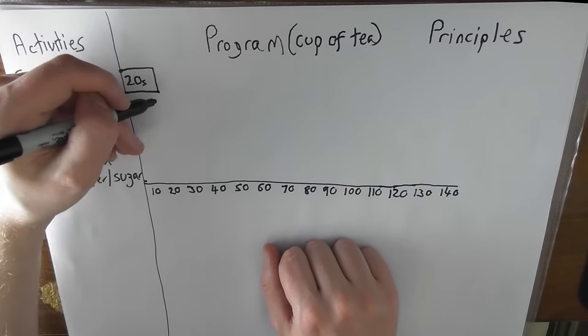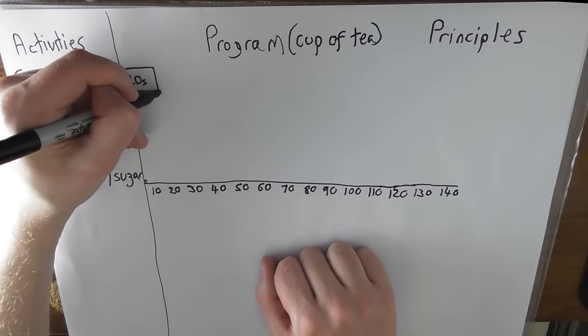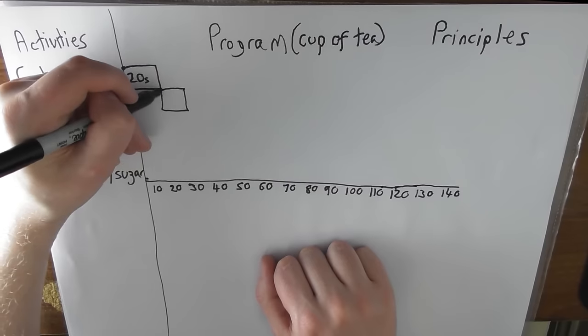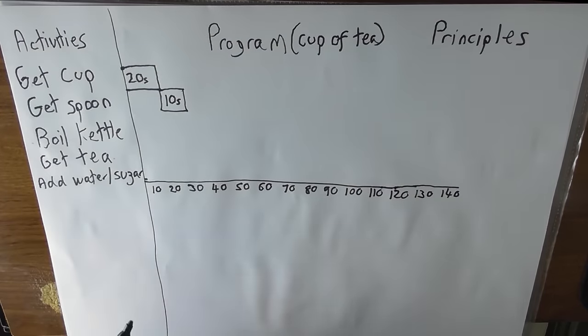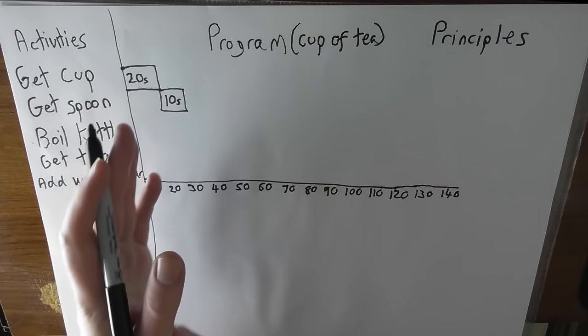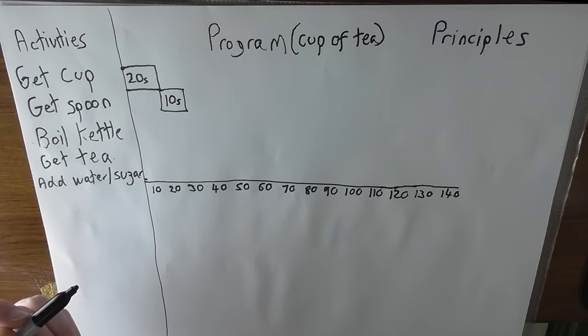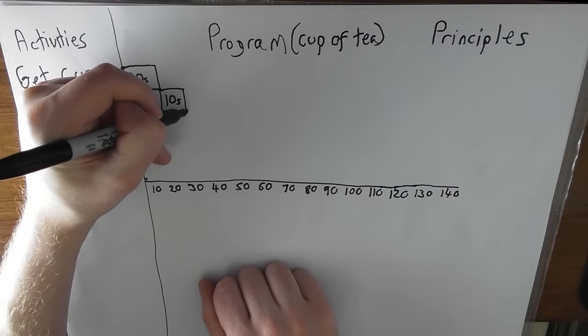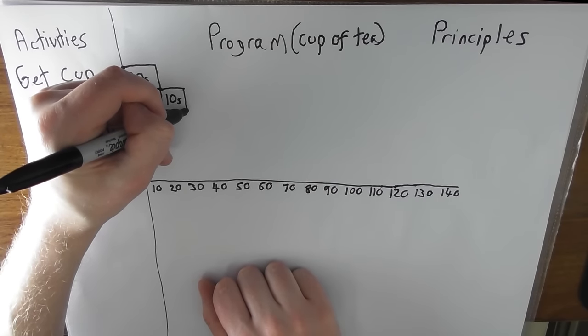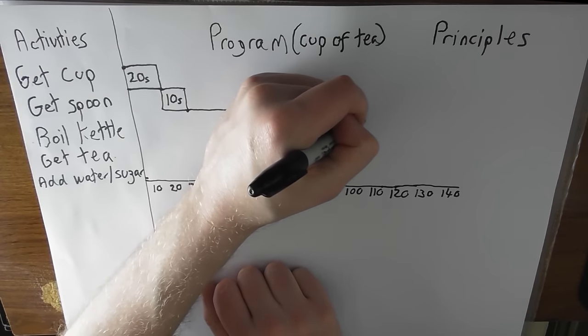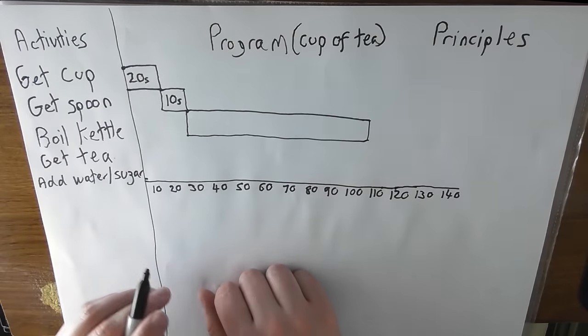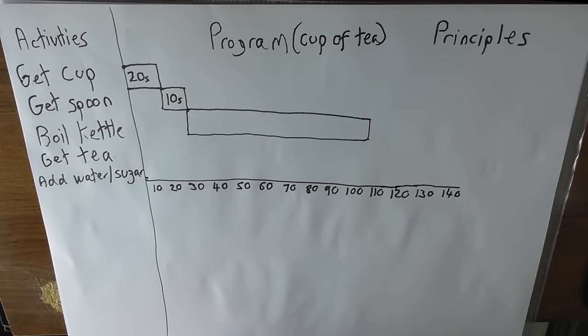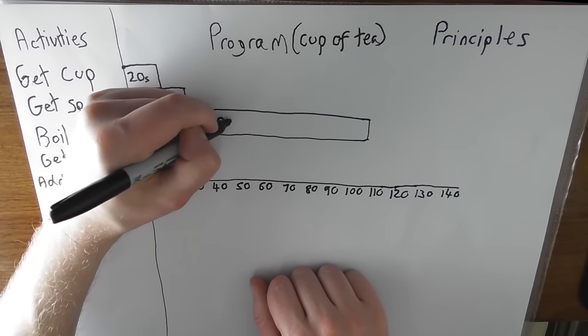After we've got the cup, we'll get the spoon. Maybe because we're already in the kitchen, it only takes 10 seconds. So, we go from 20 to 30. I appreciate the 10 second box is not a bit bigger than half the 20 seconds, but the size of the bar is really as important as what the duration is. So, we're 30 seconds into our schedule, and now we're going to boil the kettle. Maybe boiling the kettle takes, I don't know, a minute and 10, so 70 seconds. So, that's like 100, right? See my math there? Incredible. So, we've got our 70 seconds.